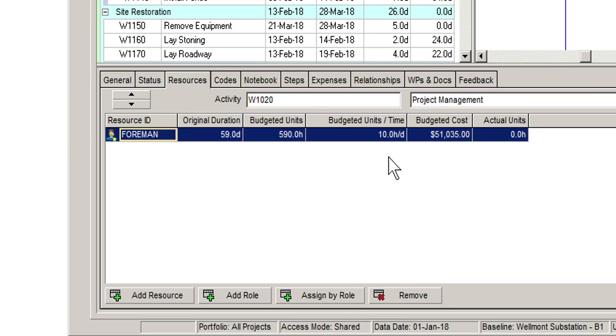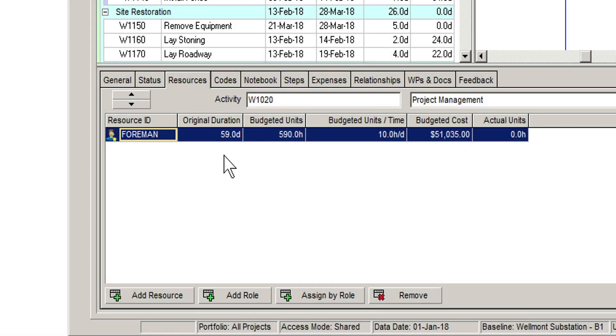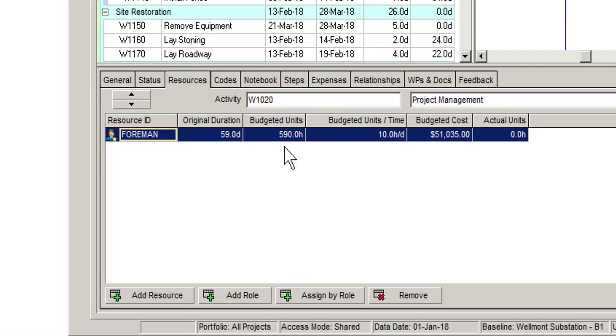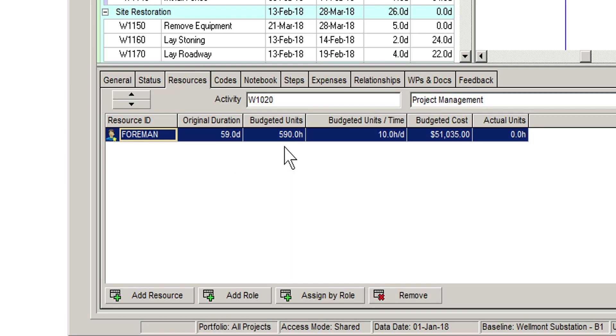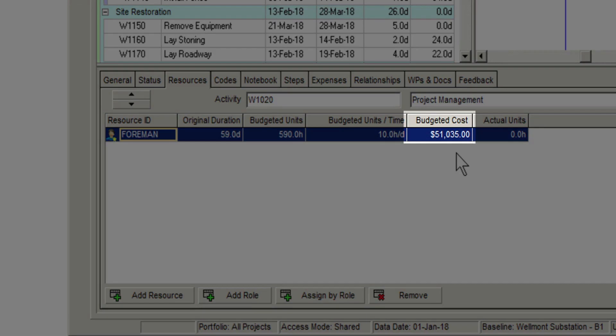You can see in this example that we've assigned the foreman to the project management activity. The total duration for this activity is currently estimated at 59 days. With the foreman working 10 hours per day, 4 days per week, we see that the budgeted units are 590. Units in this case represent labour hours. These hours have then been multiplied by the foreman's hourly rate to give us a budgeted cost.